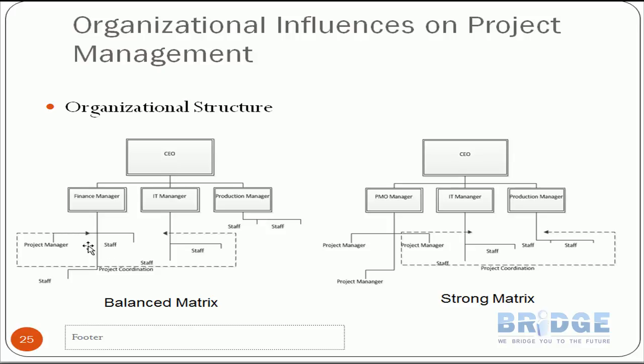Another disadvantage is that the project manager may avoid making strong decisions that could affect his relationships after the project ends, since he will return to normal operational work in his department once the project is complete.